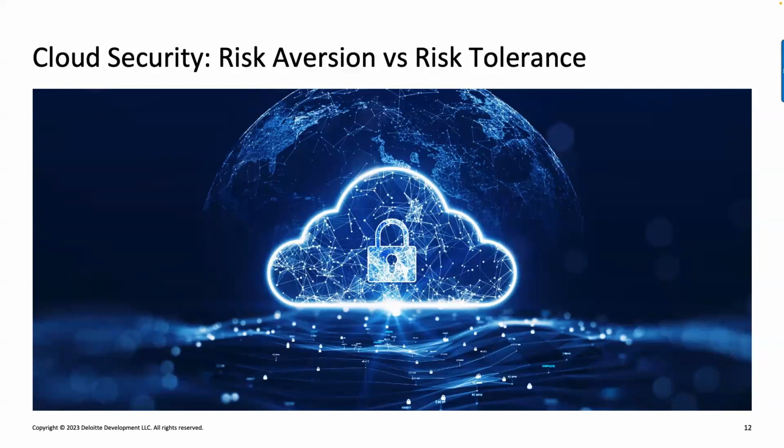Banks, healthcare, and government will take potentially 3, 6, or 9 months to review every service and try to whitelist it in terms of what can go wrong, what type of parameters you have there, where can I shoot myself in the foot, and what type of remedies you have to put there so that you don't shoot yourself in the foot, right?